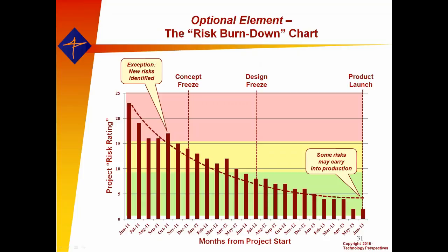I will tell you, I've been doing project management for over 35 years, and I still hate Gantt charts. I've always hated Gantt charts, and I probably hate Microsoft Project more than I hate Gantt charts. I hate it, but it's a necessary evil. Why? We can do a lot of things with visuals, and in fact, we do visual planning using Post-it notes on a wall. We create the initial plan, but we need an electronic format because critical path is the one thing that is very difficult to find on a manual plan or on an Excel plan, and we absolutely need to know that it's there.